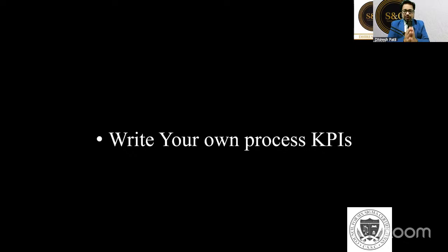Initially scope it down so that you can focus on the priority issues, and your focus will not be diluted. So the first learning for the evening is identify your key performance indicator, collect the data, and whichever key performance indicator is not performing, that is your project.